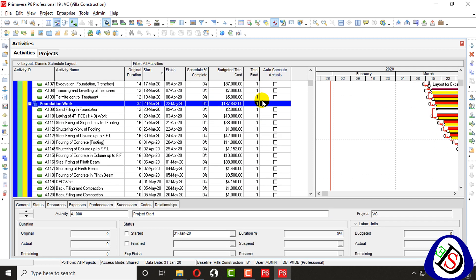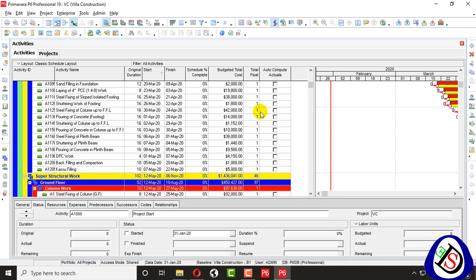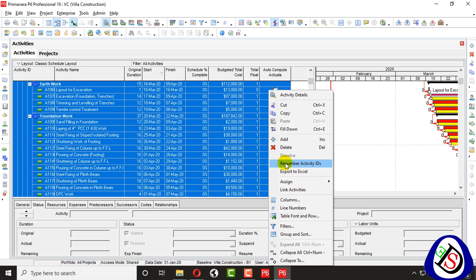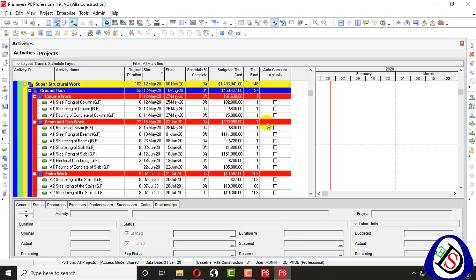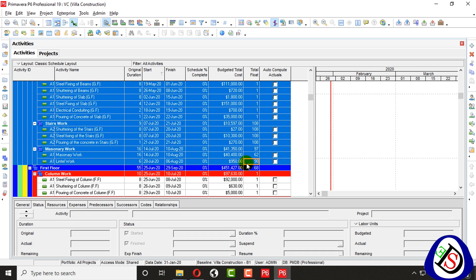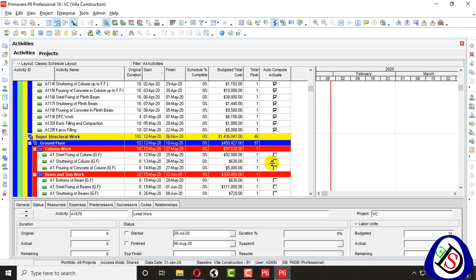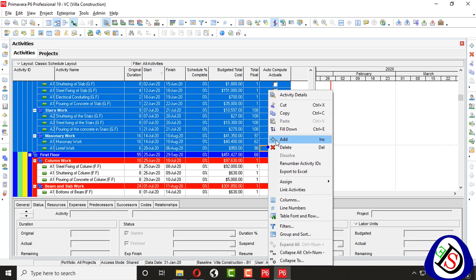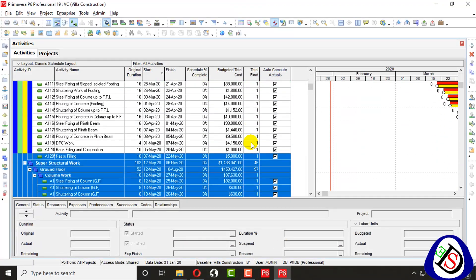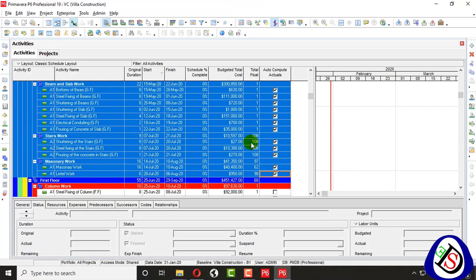When I click the first 'Auto Compute Actuals' checkbox, I will shift-click and press fill down. Here you can see all the tick marks are applied. So here you can see I have Auto Compute set up to ground flow.